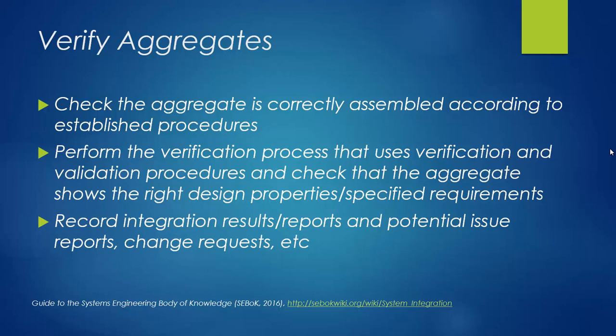We also need to record integration results reports and potential issue reports that will establish a change request if needed. Any changes that result from the integration have to be documented, and then a change order will be established, and a request will be submitted. And then if we have other steps, they can be added to that integration as needed.